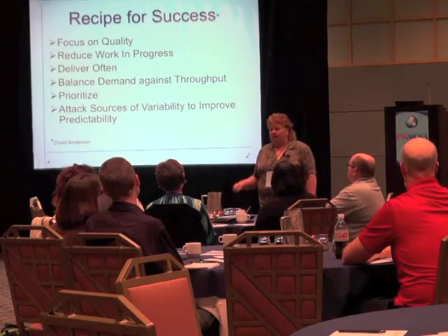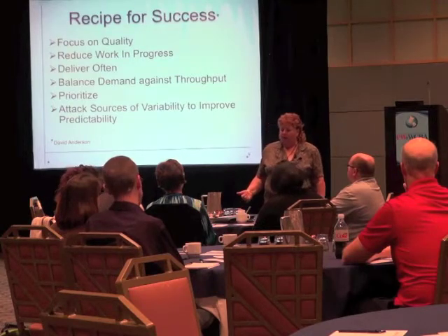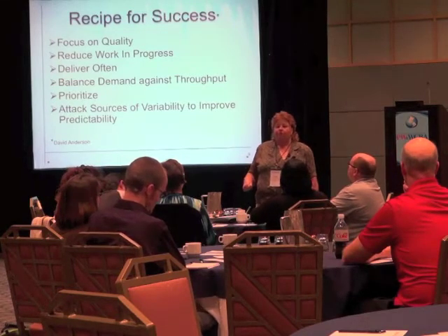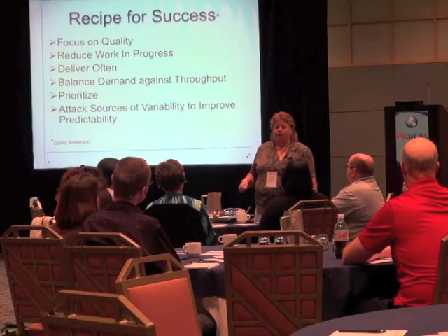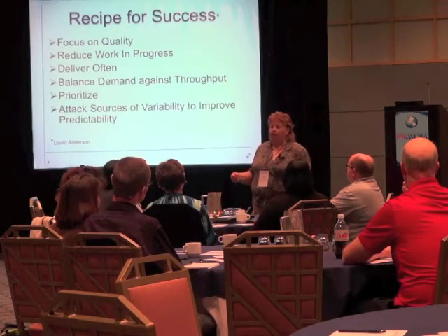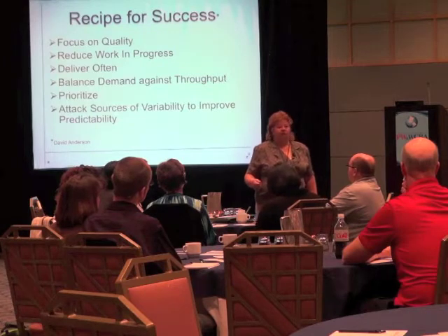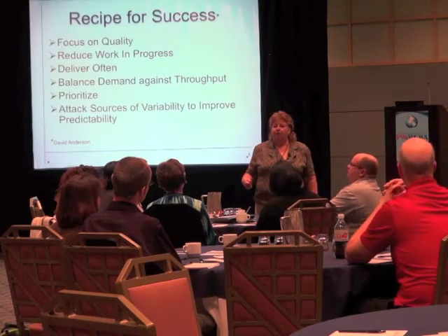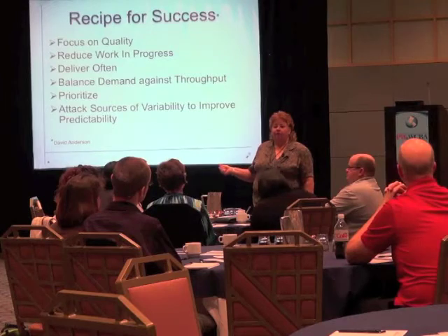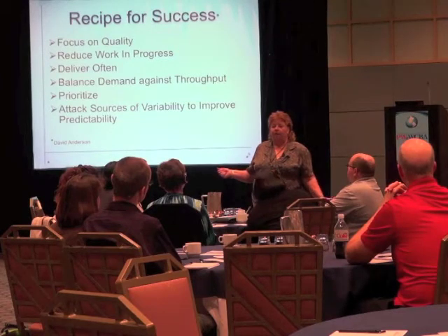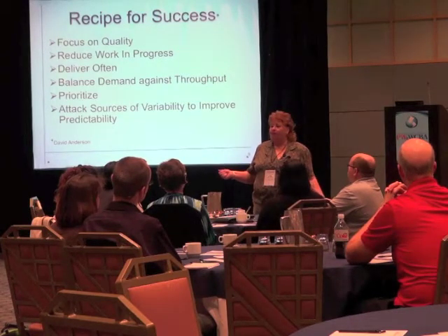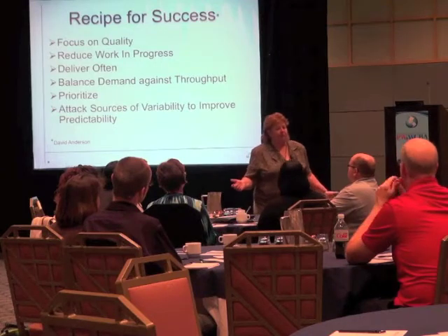And I have a team I've been working with this year that has actually doubled their velocity in the past 4 months. Well, guess what? They're on average working 60 hours a week. And guess what else happened? Yeah, defects went up. They finished their last sprint, got into their end game testing, and all of a sudden they had 80-some defects in 2 weeks. They're like, where the heck did that stuff come from, right?